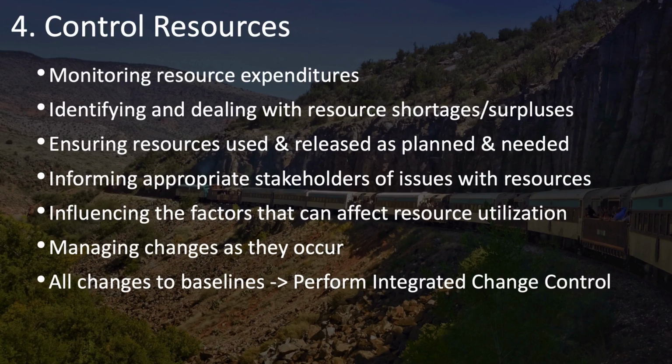Control resources is also responsible for identifying and dealing with any shortages or surpluses that you have with your resources, ensuring that resources are used when and as they should be, and that they're released when they're planned to be released and when they're no longer needed, and that you are informing the appropriate stakeholders of any issues that are related to resources and their availability and utilization on the project.